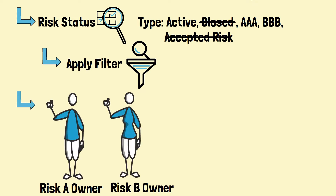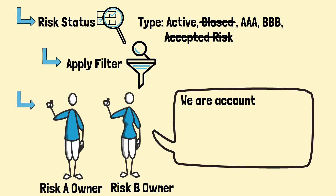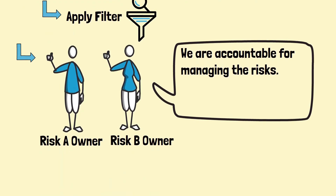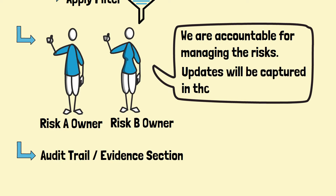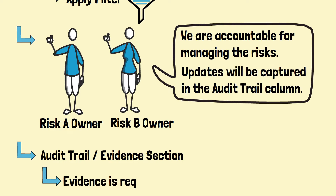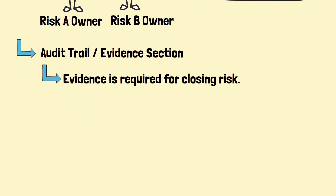There must be an owner for each risk. The risk owner is accountable for managing the risk. And there will be an audit trail section for the risk owner to update the changes of the risks. The narrative is essential, as it will provide the evidence when you plan to close the risk.